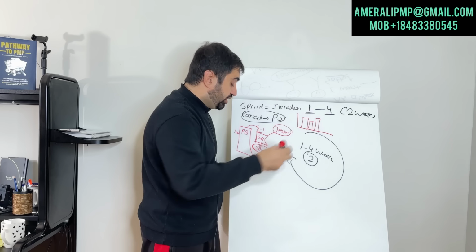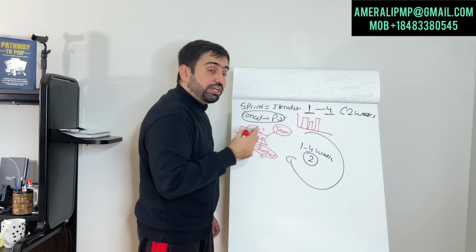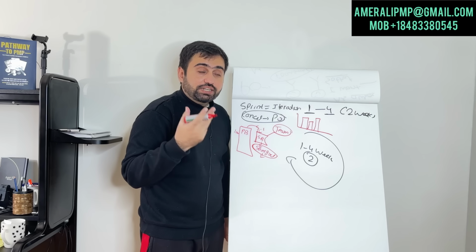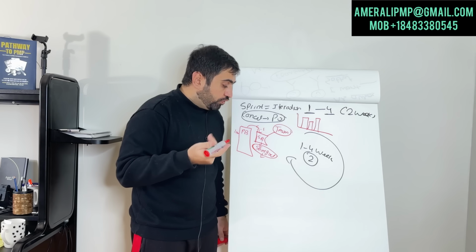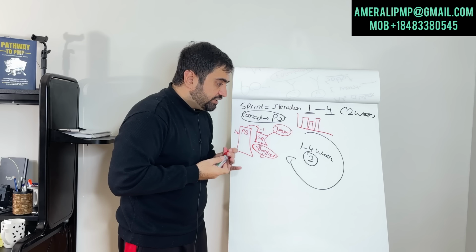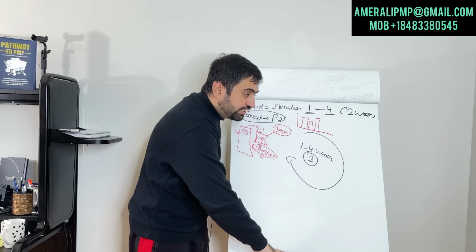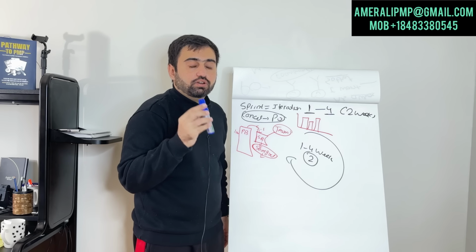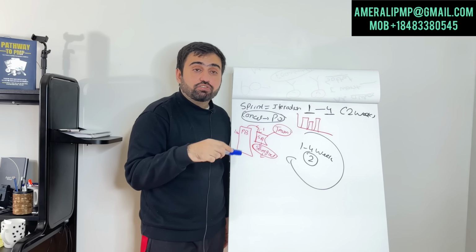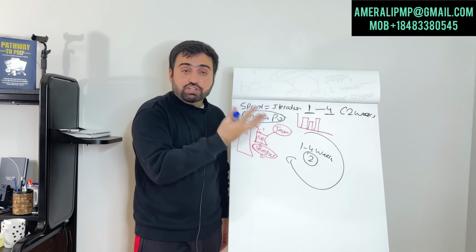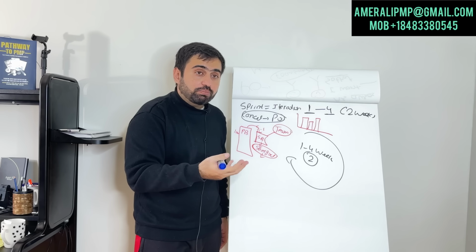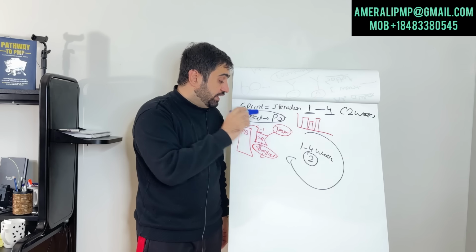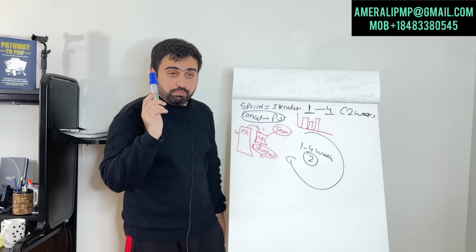We will come to the chart later on. So we get the sprint backlog, which is a subset of it. The team decides how much work we can do. Of course, the product owner will say, let's try to do more, and the team will say, we want to do less. So the Scrum Master will take the side of the team on how much work can be done. But what is valuable, which user story should be put into that? That is the job of the product owner.